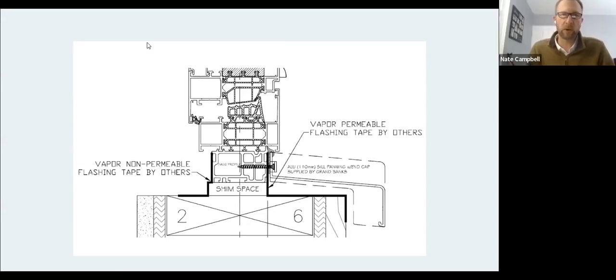I'll finish if everyone can hear me. She's seeing some issues on sea logistics, like the container we just had. It was scheduled for, again, the standard 3 to 4 weeks, and it took 6 to 8 weeks to get that product here. And those are things that are completely out of our control. They were updating us on a weekly basis: oh, it's going to be another week.